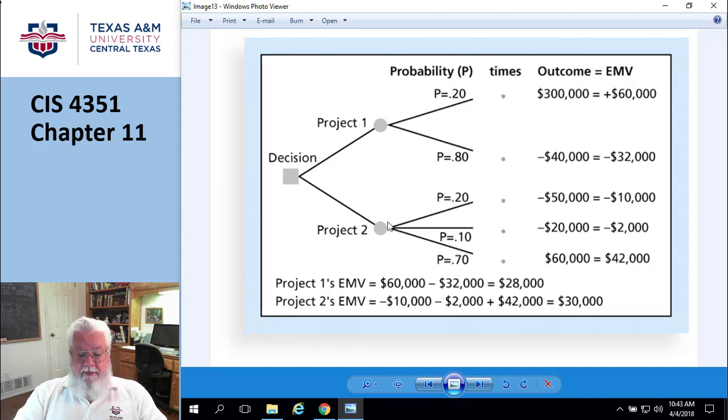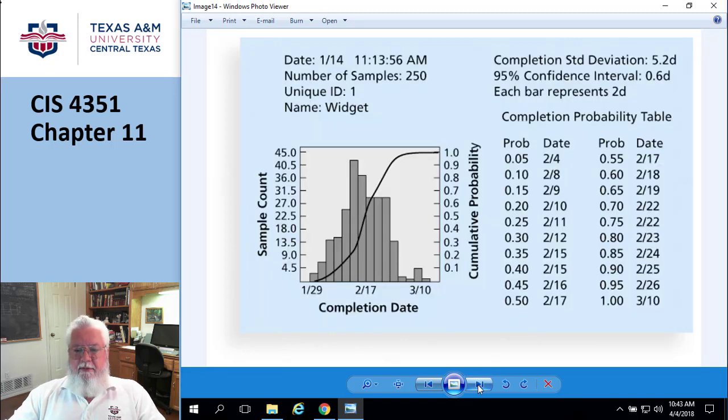So step 1 is collect the likely, the optimistic, and pessimistic estimates for each one of the variables, whatever those variables might be. Do what's called a probability distribution, and I'm going to go ahead and switch over to this little chart. So here's like the completion date. This is cumulative probability, but looking at it slightly different. So if I had picked 50% as my thing, it looks like that would be the date where it would be 50% chance of it occurring on that date, right?